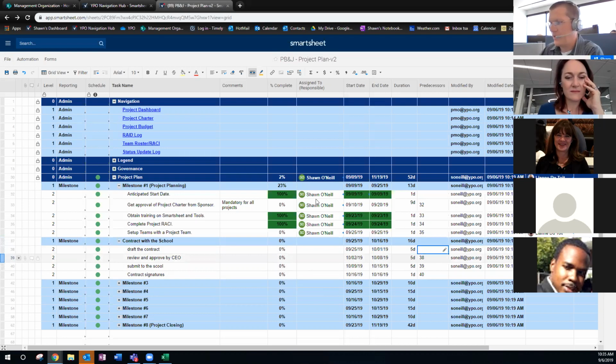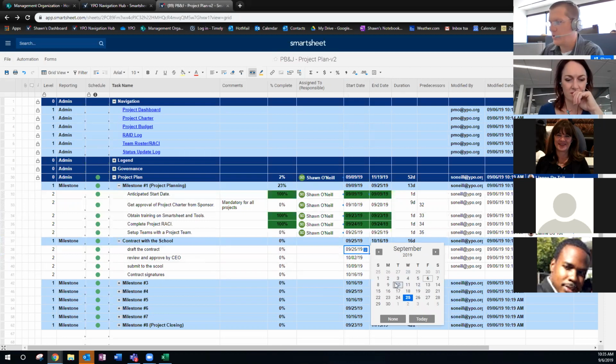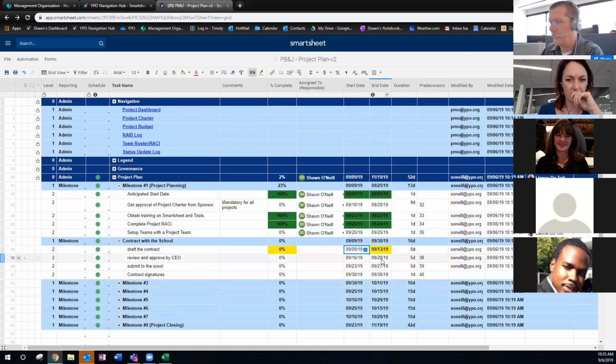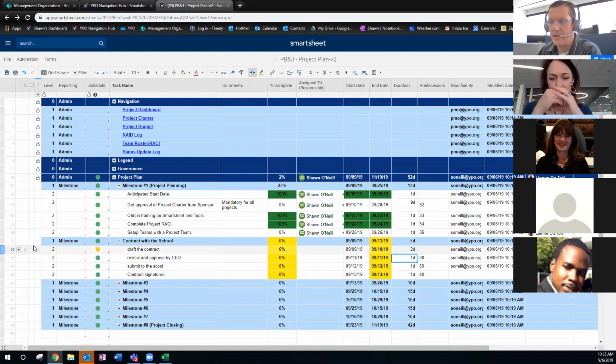But we're going to say we start much sooner, because our end date we said was going to be October 1st. So we're going to start that one, say Monday. There. So now our dates are much better, and that's not going to take so long. That's only take, let's say, 2 days to draft it, 1 day to approve, 1 day to submit, and 1 day for signatures. We're in record time here. So we're going to have our contract signed by the 13th.